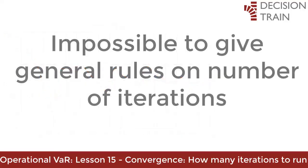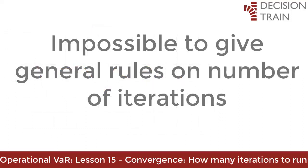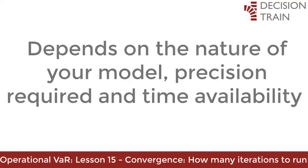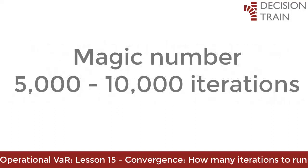To summarize, it is impossible to give general rules about how many iterations are required. It all depends on the nature of your model, the precision you require, and the availability of time. In general, the more iterations that are simulated, the more time and precision to expect. In my experience, the magic number usually starts around 5,000 to 10,000 iterations. Most processes do not converge successfully after only 200 or 1,000 iterations, and most of the time more than 20,000 iterations will not gradually improve your accuracy — but it all depends on the user's preferences.